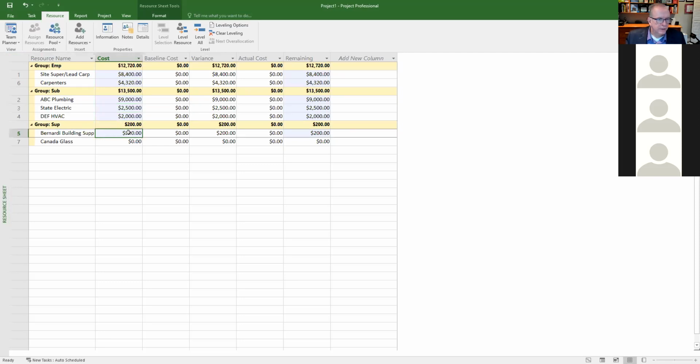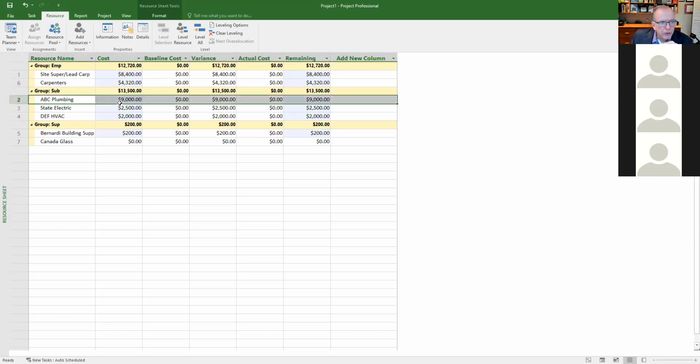So this is Bernardi Building Supply, $200. This is ABC Plumbing. So I think I assigned 4,000 at the rough-in and 5,000 at the finish, or vice versa. Well, this should add up to their contract. So whatever I've contracted for them, this should total the contract.